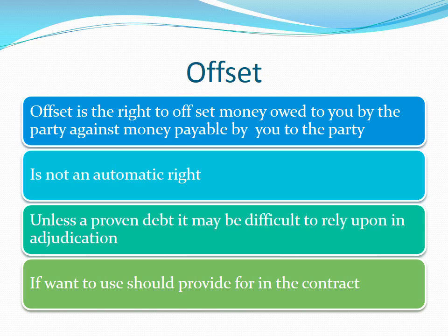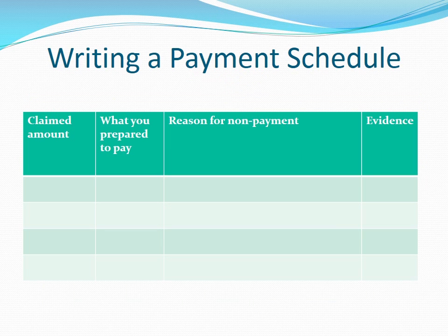Returning now to the payment schedule. When writing a payment schedule, you use the payment claim as your reference point. It is important to remember when writing a payment schedule that you are only advising if you are going to pay the payment claim in full or in part, and if not in full, why.